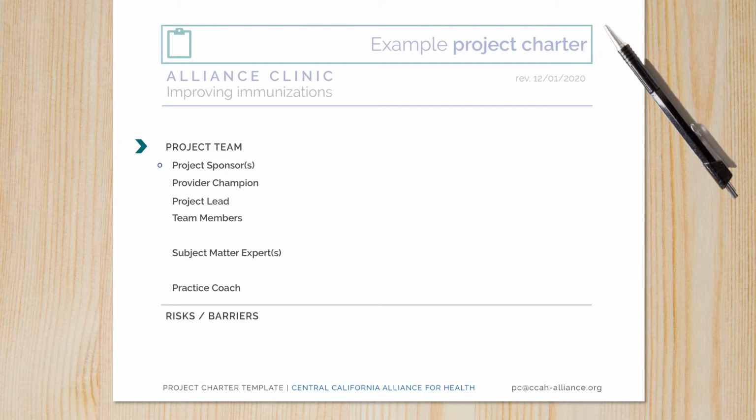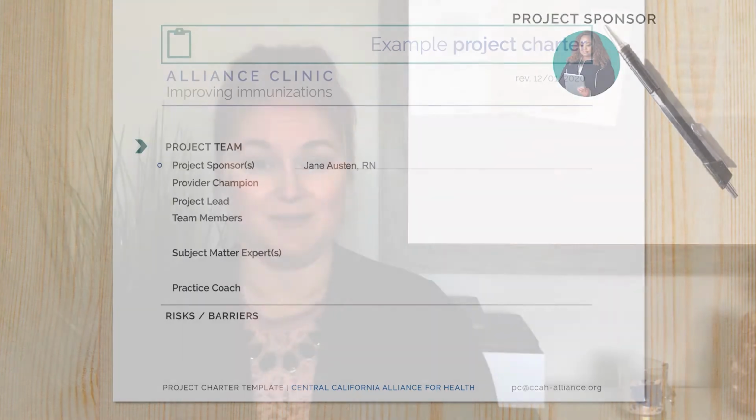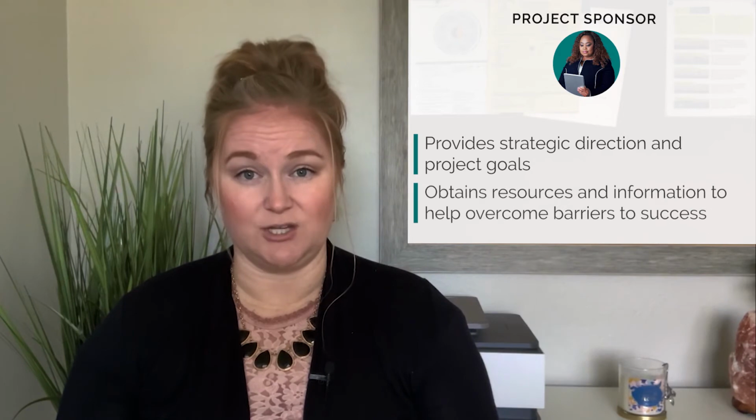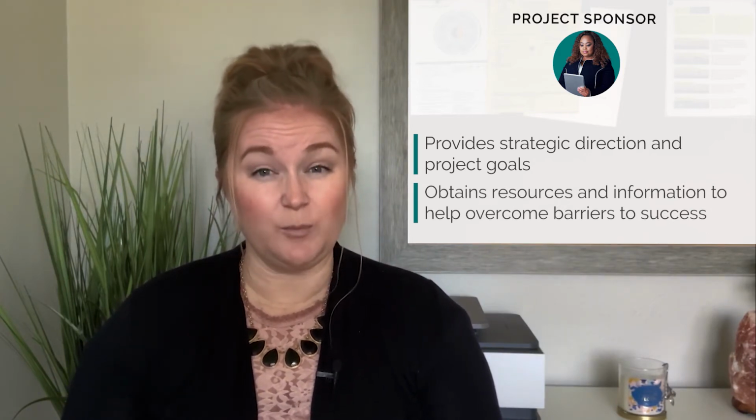The first position to be filled is the project sponsor. This person is a senior leader with formal authority and ownership of the process being improved. They're not typically day-to-day participants in your project, but will review the team's progress on a regular basis. The sponsor provides strategic direction to the team and selects the focus and goals for improvement. They also review the team's work plan and may act as a liaison with other areas of the organization. By providing resources and helping the team to overcome barriers, the sponsor has a key role in ensuring the success of the improvement project.